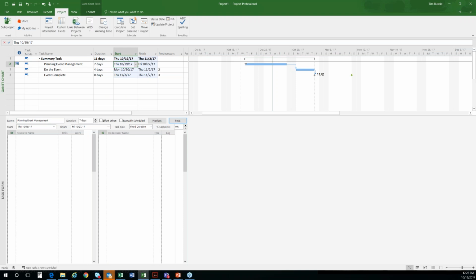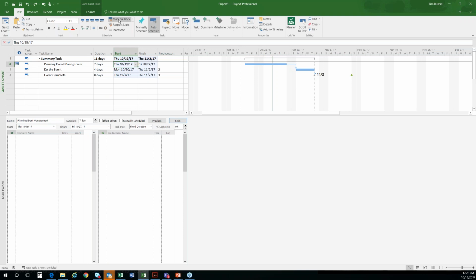And if you come over here and say, let me just drag that percent complete up to today's date, or let me hit undo, so undo. If I come over to my Task tab and say, mark that on track, mark it done as of a status date or today's date. You can do this for one or multiple tasks, but the idea is we don't really care. Once we start marking a task a percent complete, it locks it in place. So what I usually tell people is get it there whichever is the fastest, the easiest in terms of your starts or your actuals, because you're going to mark it done. And it's not going to matter whether it is or isn't constrained, because technically this thing is not going to pick up and move once I even put 1% complete on that.